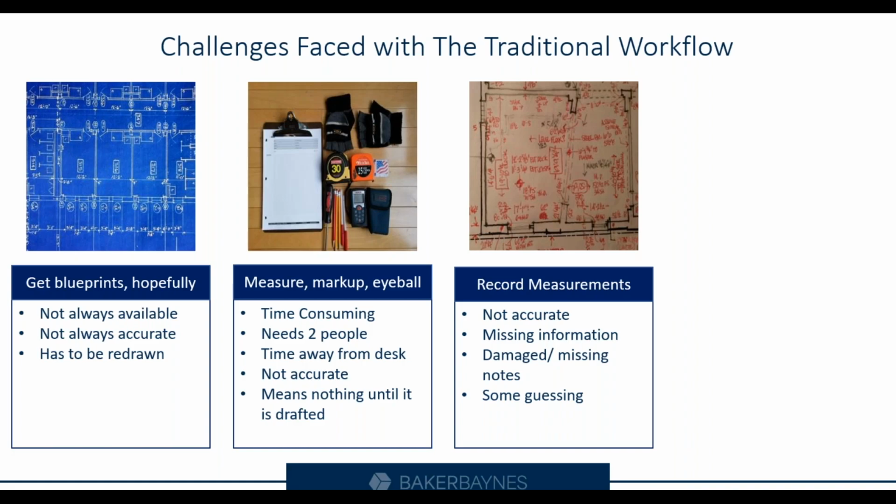Due to the complexity of a lot of projects, the sheer number of measurements that need to be taken is a lot, and a lot of them can be missed during the initial site visits and measurements. Moreover, multiple site visits could disrupt the project schedule, and as we all know, that could lead to even more delays. When multiple site visits are required, these revisions not only consume additional time and resources, but also introduce the potential for errors and inconsistencies throughout the project.